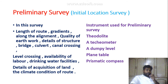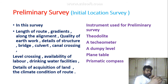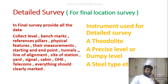The next type is preliminary survey, also called initial location survey. In this survey, the following are determined: length of route, gradient along the alignment, quality of earthwork, details of structures such as bridges, culverts, canal crossings, level crossings, availability of materials, drinking water facilities, details of land, climate conditions, and route. Instruments used for preliminary survey include a theodolite, tachometer, dumpy level, plane table, and prismatic compass.